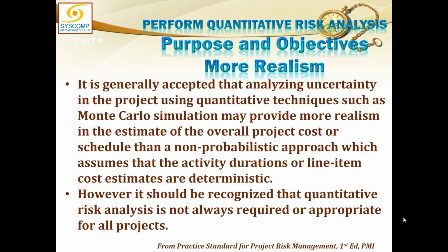So how much can I delay this activity if I use one deviation plus? That means 3.83 was the duration estimate, and if it is delayed by one deviation, 1.5 will be added to it. So how much does it come out to be? 5.33. So I will be comfortable if this activity is delayed and it takes 5.33 days. The danger has increased, but I am comfortable that yes, this could have happened.